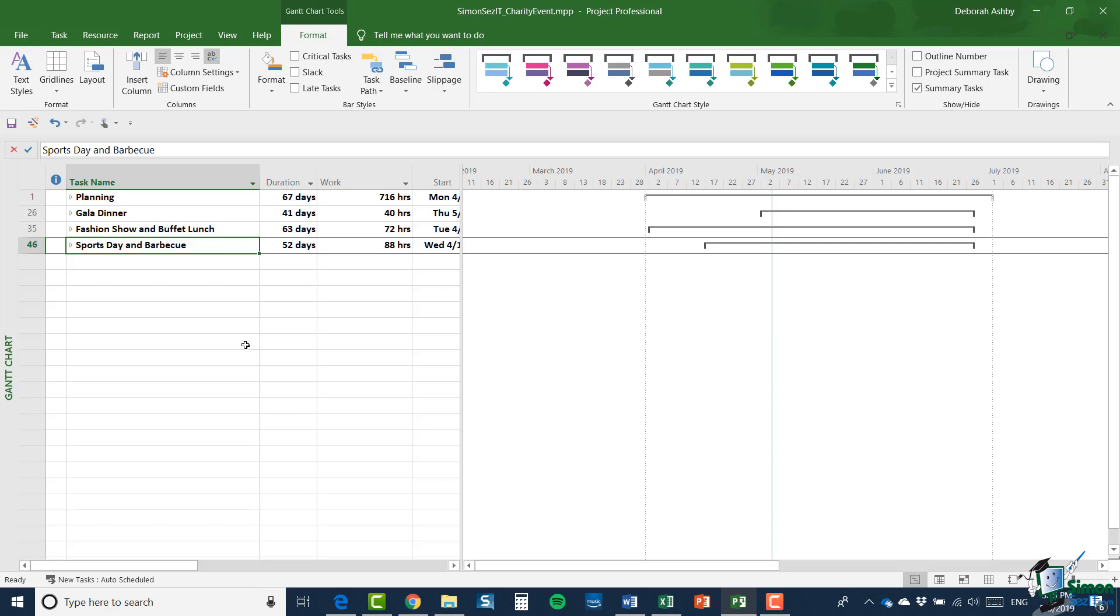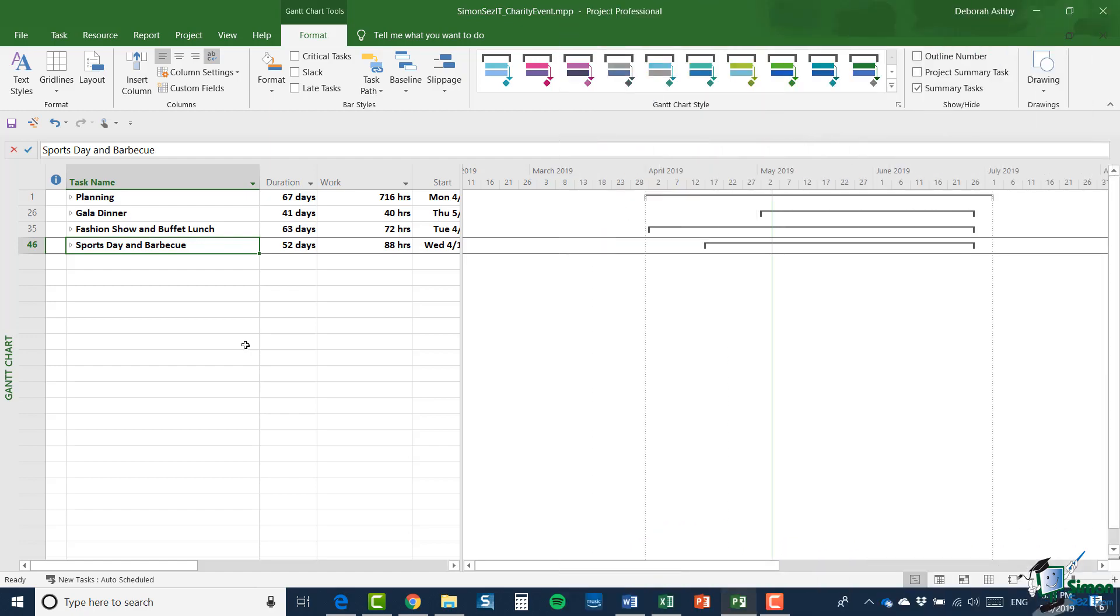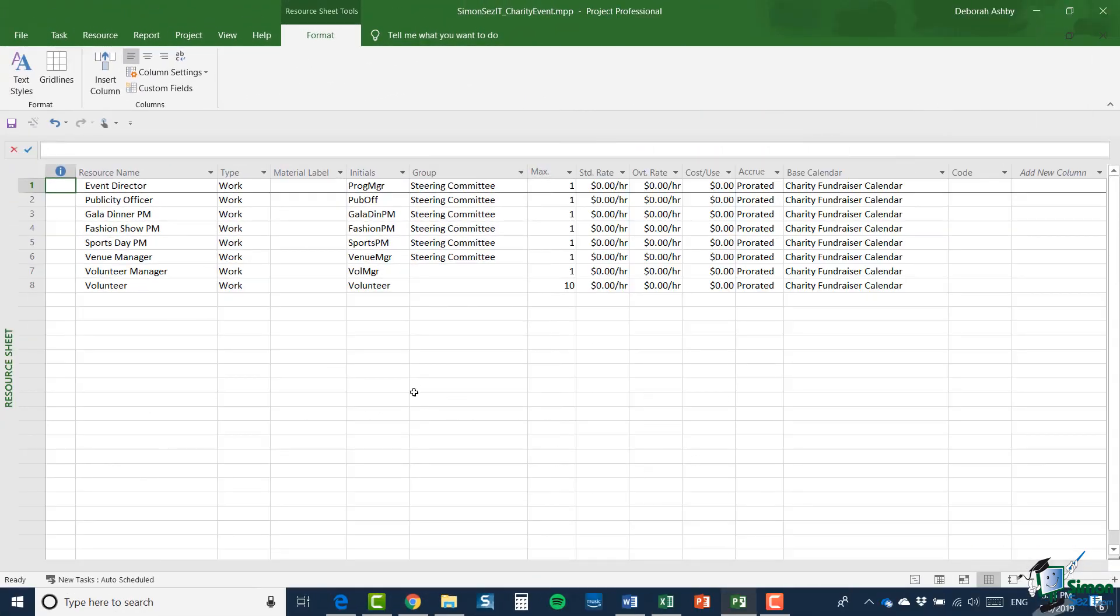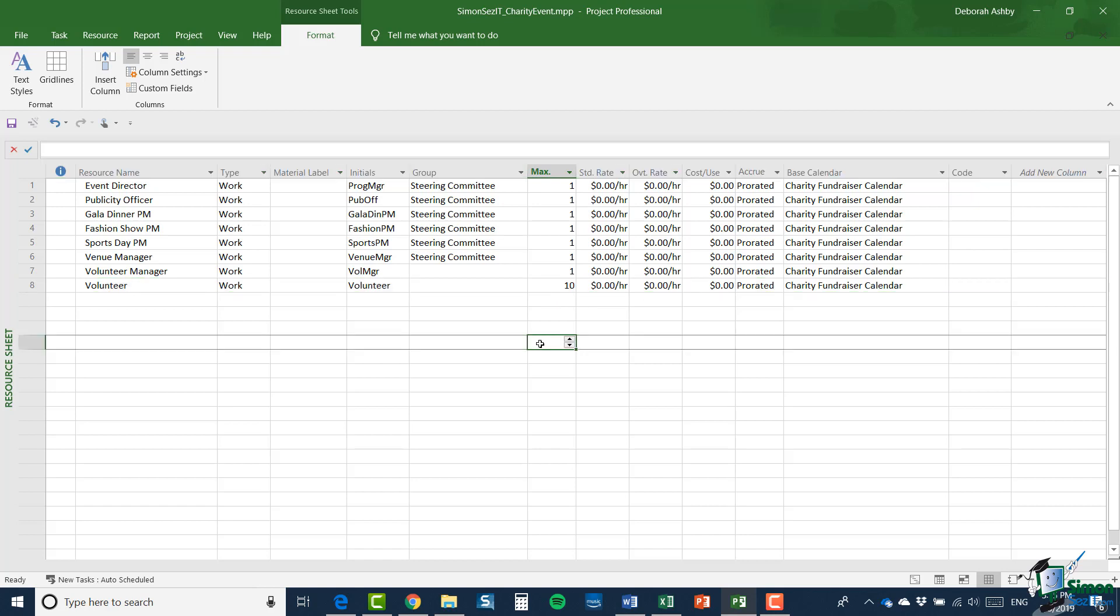Now, before I get started on splitting this program of work into four separate projects, what I'm going to do is take a quick look at the resource sheet. Now I've got here eight resources at the moment, although note the last one, volunteer, we're counting on getting 10 or possibly even more volunteers to help on this charity event. I've left the standard rates at zero.